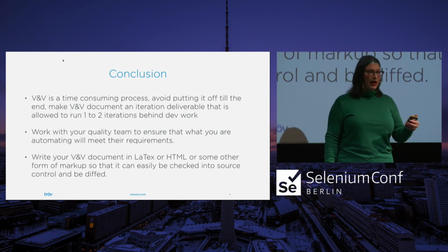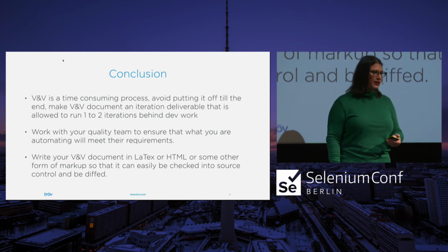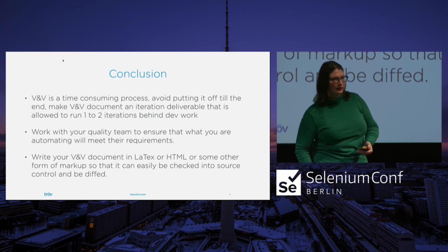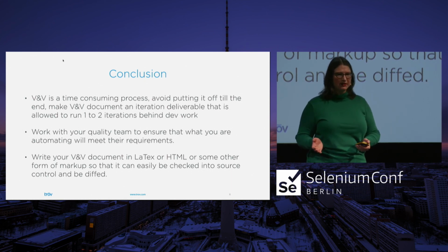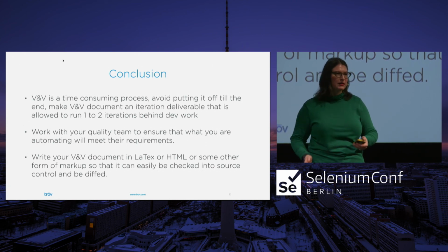And ideally, I would move the stories to an entirely different board that illustrated we did our initial checks, we're writing our automated tests, we've added everything to the V&V. Now the story is done. And it's not done until it's in the V&V. Because that is when that feature is complete, from my perspective. Which basically means it's almost an entirely different software project. You've handed somebody something, and then you've said, do your project and your process on it.